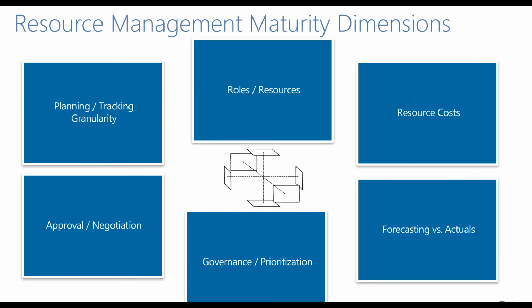Other dimensions of resource management are things that we may want to consider. In the top, we look at roles and resources. Sometimes folks do resource planning in a very generic way by resource roles and resource types, you know, a developer, a business analyst, etc. And then maybe that's good for early planning, but ultimately you're going to have to decide what resources specifically are going to fill that role in a particular project. So the idea of what level of granularity from that perspective you're going to plan to.